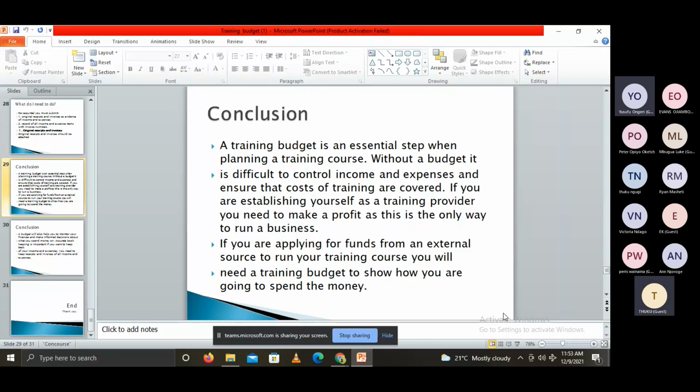But within the next 3-4 months, that price has moved from 120. The price now is 130, an increase of 10 shillings per liter. That will ultimately affect your price. How do you handle risks that are associated with fluctuations of prices for goods and services?